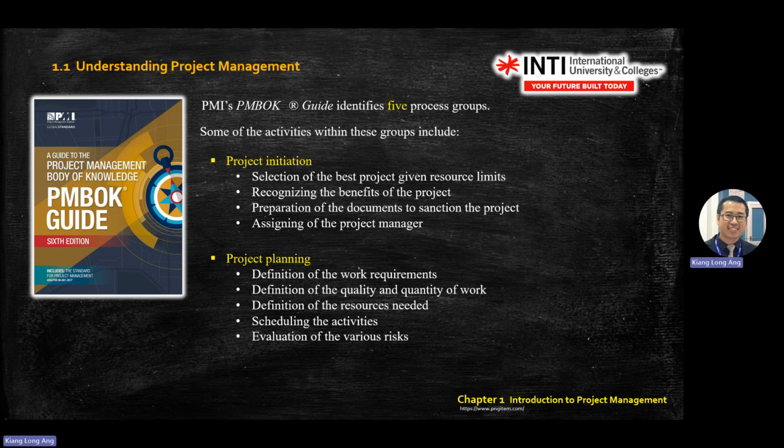Okay, so when you manage projects, the most challenging decision is to cancel the project. If you can cancel early, good. If it becomes like 75% or more already and you want to cancel the project, you can also, but you will have some losses to the company, which will not be a good sign.